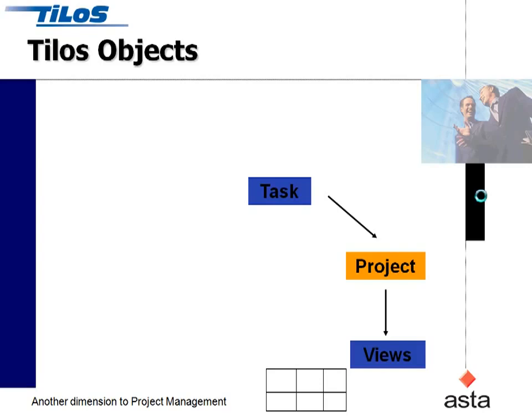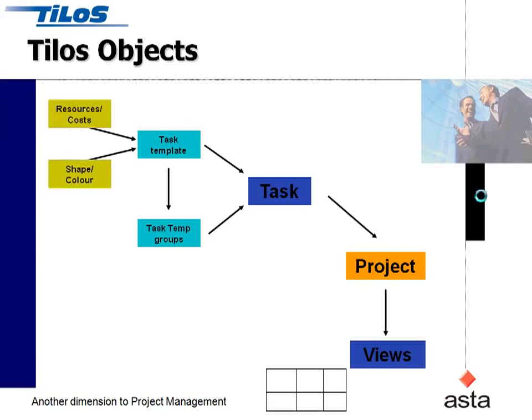A number of those tasks go to make up a project which can be seen in a view. When we create a task in Tylos, we base it on a task template that we've already created — a prototype task. Those tasks can be preloaded with a line style and color, as well as resources and a production rate. That information allows us to be very rapid in project creation in Tylos.